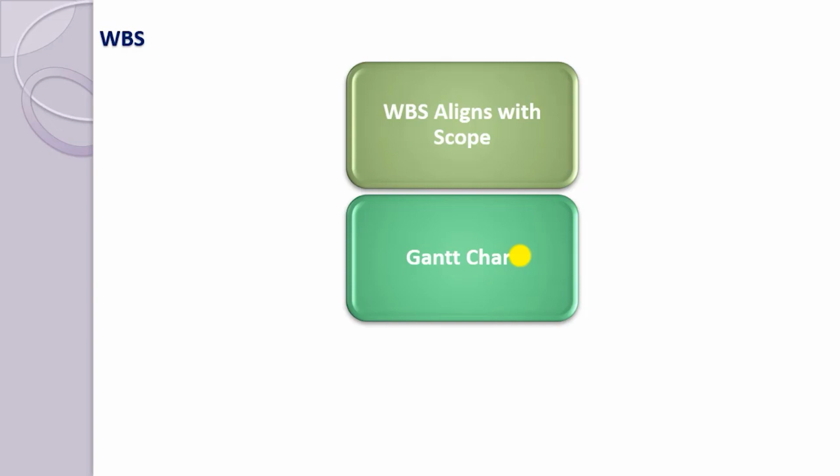The reality with modern knowledge work, however, is that specific skills are usually required for particular tasks. Reallocating coding work to your design specialist isn't very likely to speed up the project, but perhaps more realistically, bringing someone into the team for 2 weeks when there is intensive coding to be done may also slow the project down rather than speed it up.